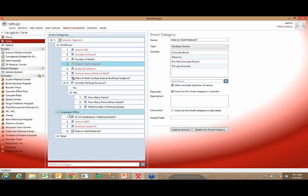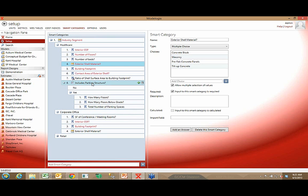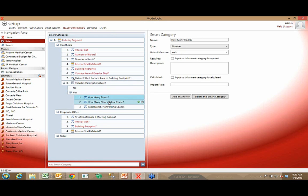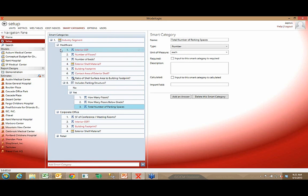For corporate office projects, you can have attributes like building footprint, and questions like total square footage of conference or open meeting room space. Project attributes can vary based on preceding attributes, and the system can even support logic — for example, if there's a parking structure associated with a healthcare project and the answer is no, no further attribute questions appear. If yes, you're prompted for number of floors, floors below grade, and total parking places. It's all user-defined — create as many attributes as you'd like.